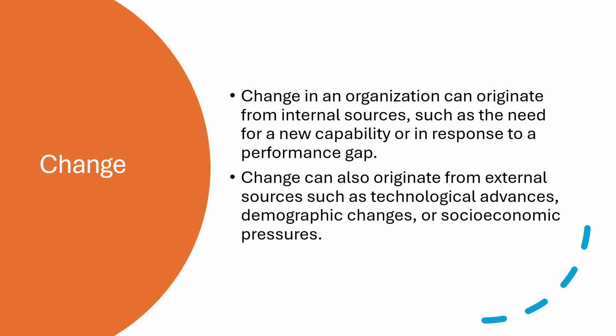The benefits should be communicated to all levels of the organization. It's also important to adapt the speed of the change to the change appetite, cost, and ability of the stakeholders to accept the change. If we create too many changes in too short of a time, then there will be change saturation. Even when people have agreement that the change is good for them, they still have to adapt to it. They need time to learn.